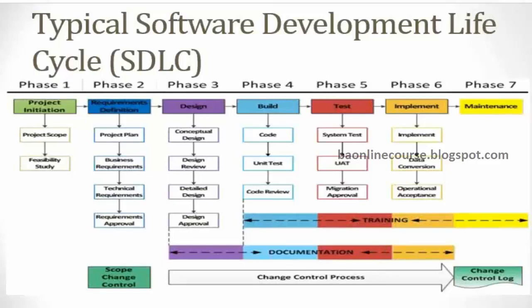And when do you use a waterfall model? When there are short-term projects, you probably use the waterfall model, or when the client has proper visibility of what he wants, and the requirements should get frozen, a solid baseline. That time we can use the waterfall model.